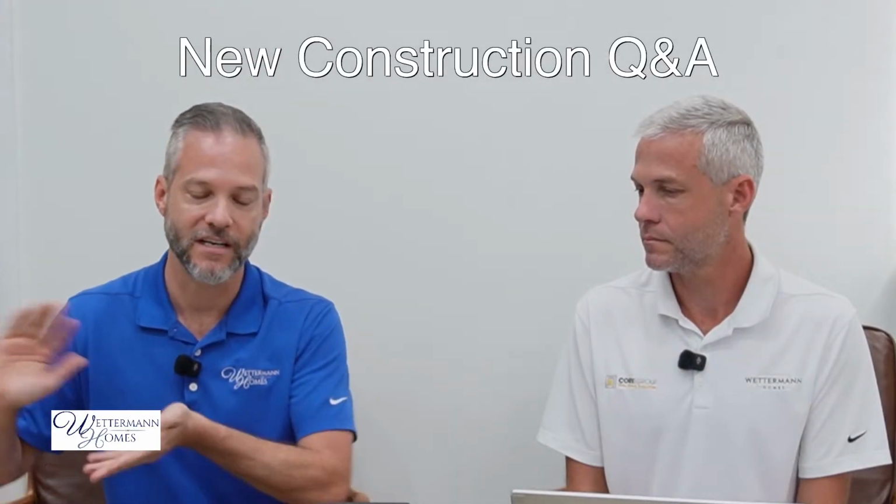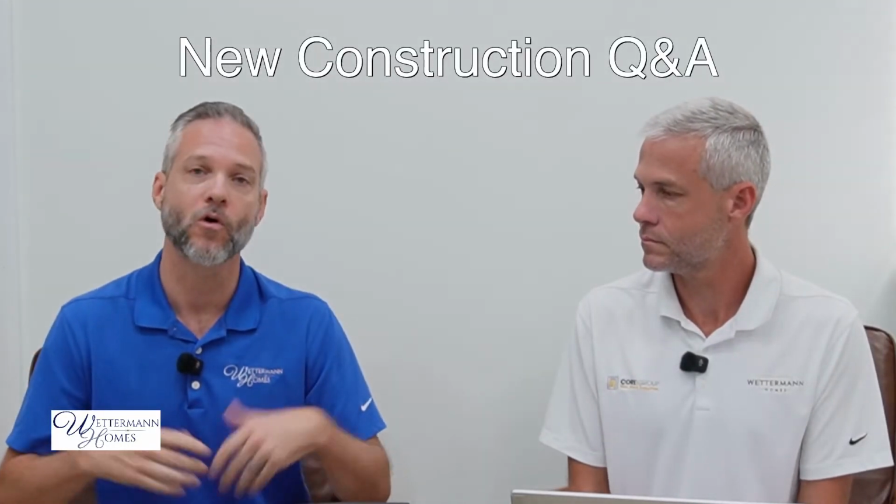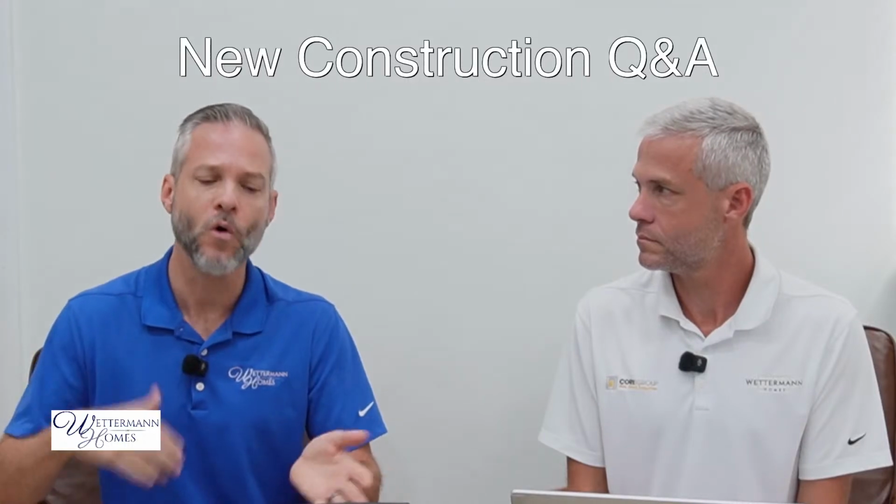The person I spoke to at Seminole County said, yeah, it would be a special use permit, and here's what you do. Then he actually emailed me back and said, I talked with a couple of my colleagues, and if you do a pre-application and provide certain documentation as far as what you want to use it for, how often you're going to have functions there, whatever the function may be, how many people it's going to be, it's $50, and then they'll go through everything.